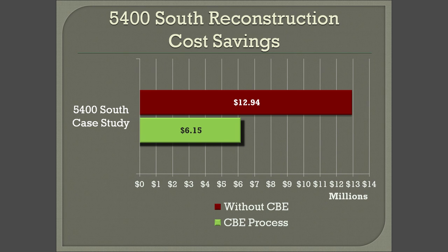And we got with the design team in Region 2, and they completely changed the design. After we did the cost estimating, we came up with the cost of approximately $6 million or so. With all the other contingency, the budget for the project was around $8 million. We changed the whole project from the Band-Aid to full reconstruction. The full reconstruction was excavating the road almost 23 inches, putting in the granular borrow, road base, pave it, widen the road. We've been able to change that project to full reconstruction with the addition of $200,000, which they loved the idea.